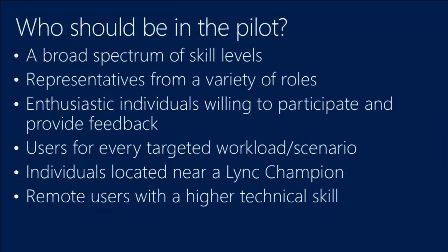Who should be in the pilot? So how do I select the users for a successful pilot? I've seen customers who are planning pilots with, let's say, 10 users from the IT department, everyone sitting in the same room. So they start the pilot, they think, wow, it's great, hey, I can call you, hey, I see you on the video and see you at the same time sitting over there. They do that for 5 minutes, and then they stop using it because it's not a real scenario. It doesn't make any sense.